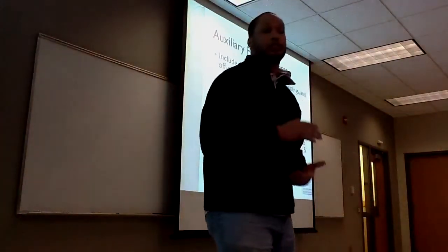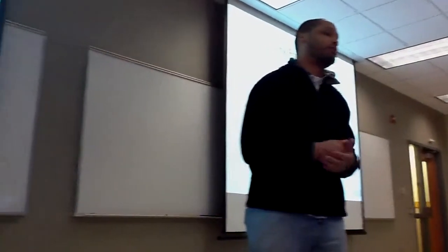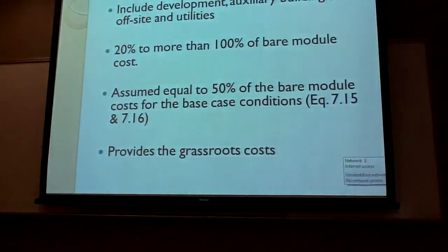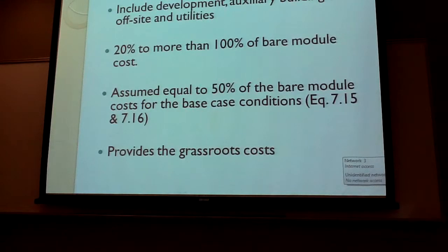The auxiliary facility costs will include new developments, auxiliary buildings, on- and off-site buildings, and new utilities being added to your facility. According to the book, 20% to more than 100% of your bare module costs are used for these auxiliary facility costs, but it is assumed to be equal to just 50% of the bare module costs. You would add basically 50% of that cost to the bare module costs using base conditions, and that would give you your grassroots costs.